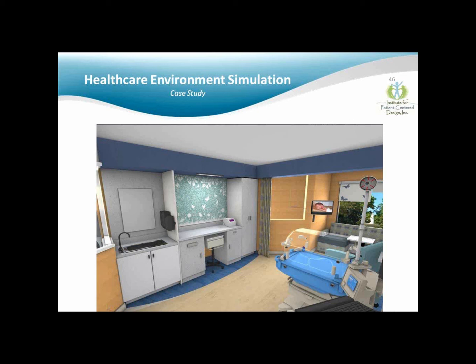As we said, one of the key values here is having end users give their first-person feedback and their sign off, saying, I truly understand this environment and it is correct for me as long as I have my anesthesiology cart moved here and this boom placed 18 inches to the right in the ceiling. They make all of these changes, and there is a save feature within the software that allows you to save that exact environment as it was manipulated, with a name, for example the physician's name or a date or whatever you'd like. That can be used in the future as, no, Dr. John, this is exactly how we discussed and you signed off on the environment.